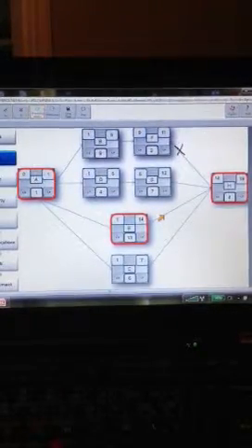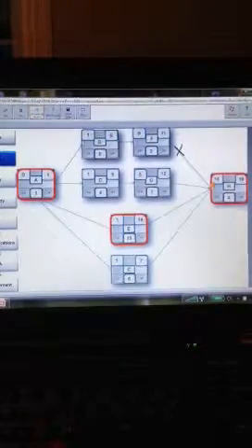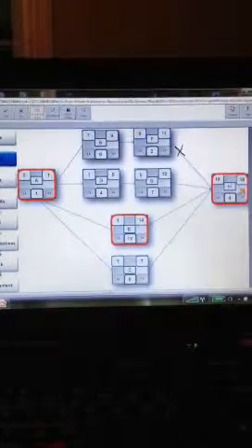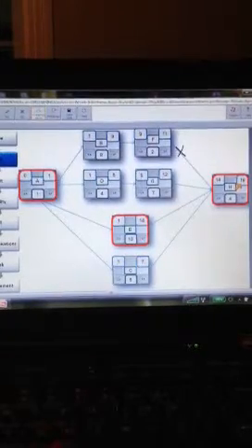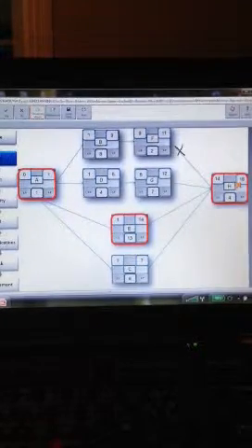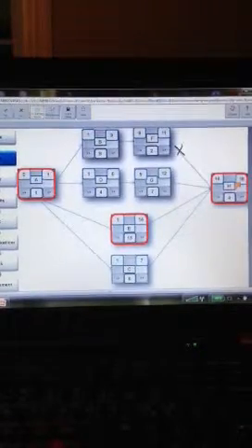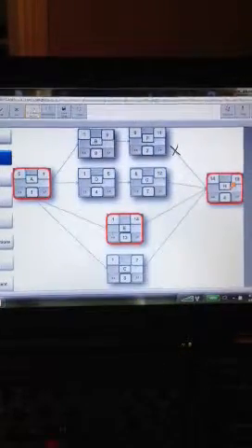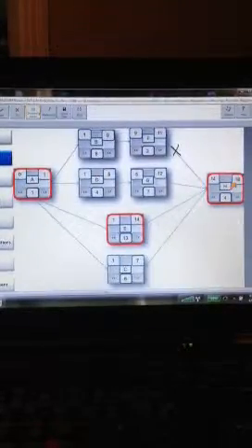We have 11, 12, 14, and 7. We're looking for the longest total duration. So that's why H has 14. Now we can continue on. 14 plus 4 gives us 18. So if they ask what the critical path is, with 11, 12, 18, and 14, obviously you're going to choose the biggest number. If they just show you letters, A, B, F, and H, A, D, G, and H, and so on, you would choose the answer that said A, E, and H. But that's as hard as it's going to be. Any questions on that?